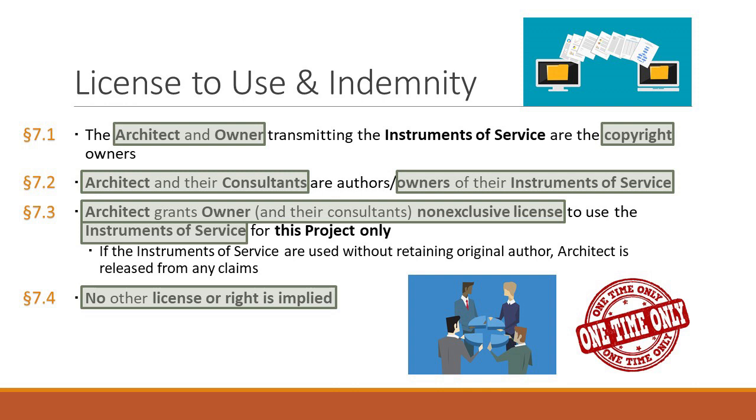But I may have discovered that in phase 2. I may have seen it. It may have come up if you had me on site. But you didn't. So you never gave me an opportunity to fix my mistake for phase 2. And since you didn't give me the opportunity, I can't be held liable for not performing in accordance with the standard of care for phase 2 because I was never involved. And our contract's for phase 1 only. You can't create some contract with me for phase 2 when we don't have anything. So you can't sue me for that. So that's what this is here.